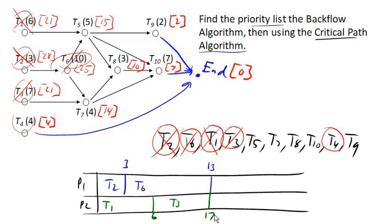So when task...let's see here. So at time 13 here, task 6 gets completed and task 3 gets completed. So task 3 and task 6 both get completed. And that means that this task is ready and this task is ready. So 5 and 7 are both ready now.